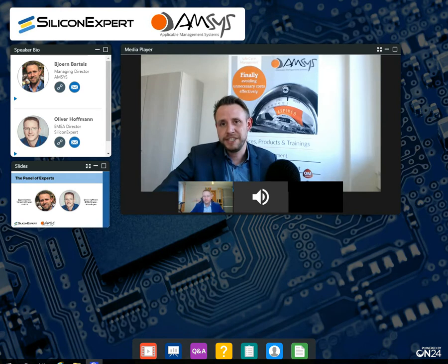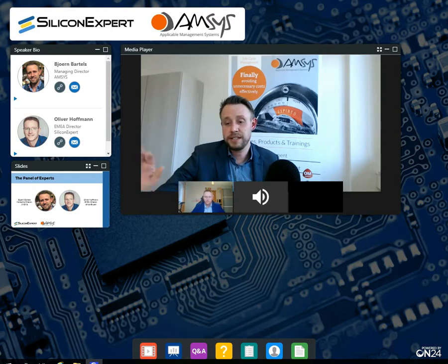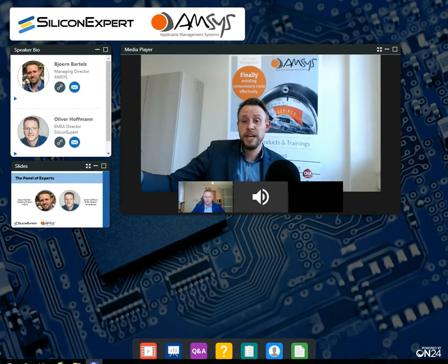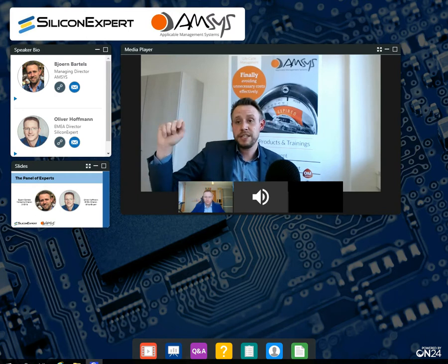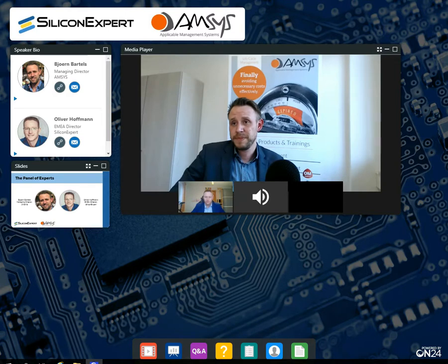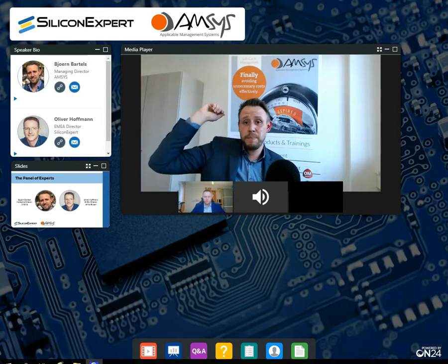is not really relevant. If you want to use a correct methodology, I could talk for the next 2 hours about it, so I will not go into too much detail. If you want to use the right methodology, it goes down to the formula. The question in advance is what would possibly happen if an item in my system would eventually become obsolete? It's not a matter of the piece part price of the component, because an item that only costs you a cent screws up your overall system, and you might be losing millions and millions of euros.